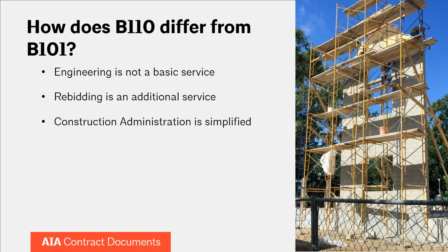We talked about this a lot because occasionally architects have experienced situations where owners believe that they can save money or cut corners by having multiple primes. And it's a very complicated way of administrating a project, and it's full of risks. And we feel that this is an important clause here.